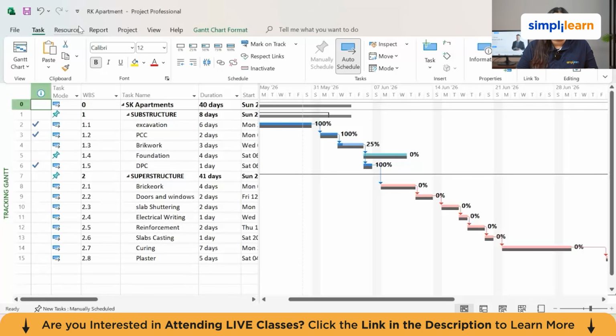If you use the duration percentage, your EVM report shows 60% completion, but the actual physical progress is 40%, so you are overstating your earned value by 20%. Over a large program, that difference becomes significant. It makes the project look healthier than it is. Now the physical percentage complete solves this.